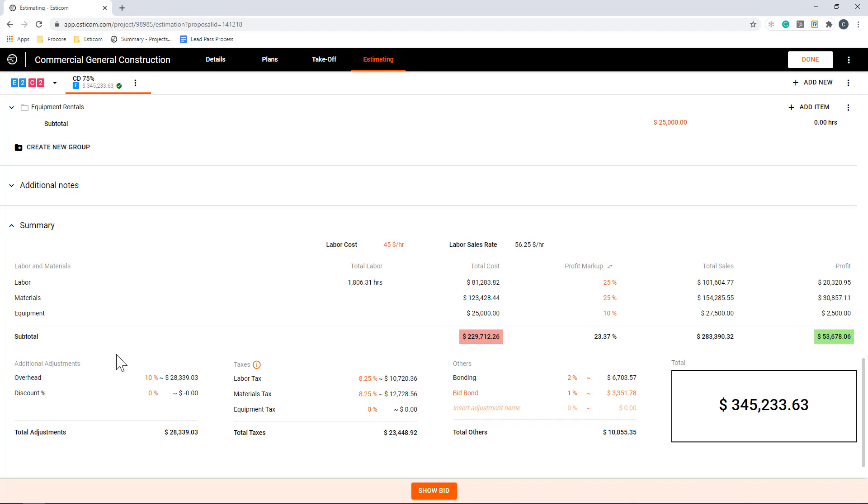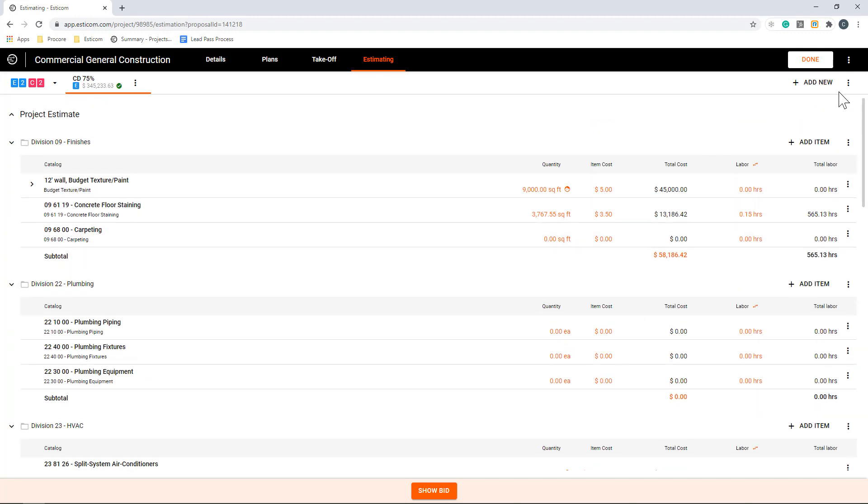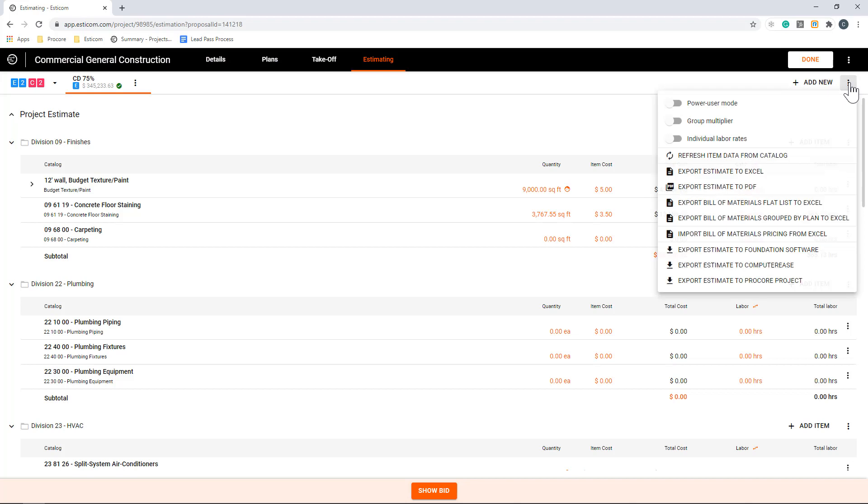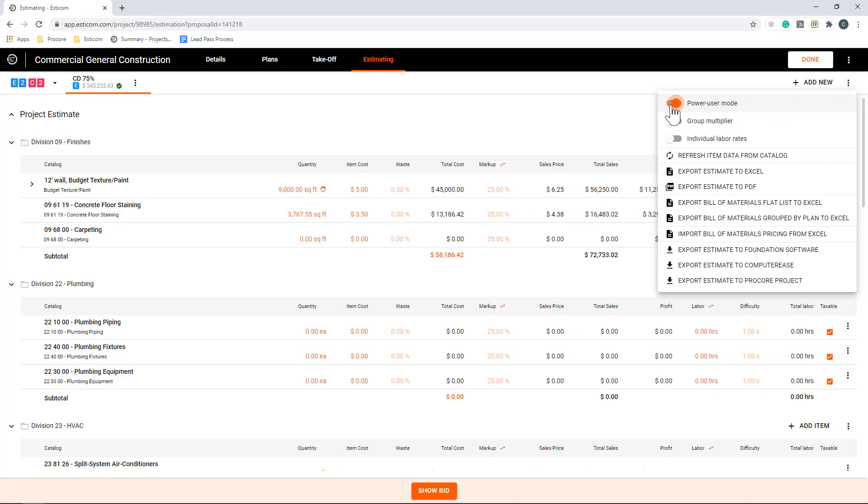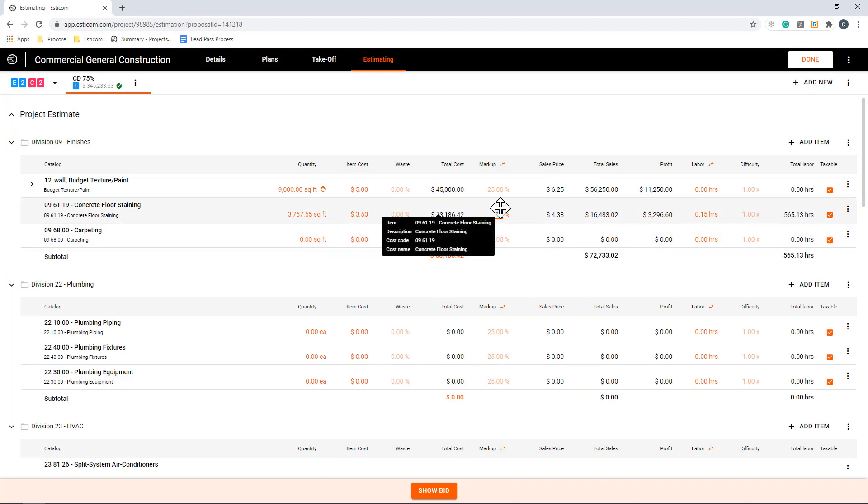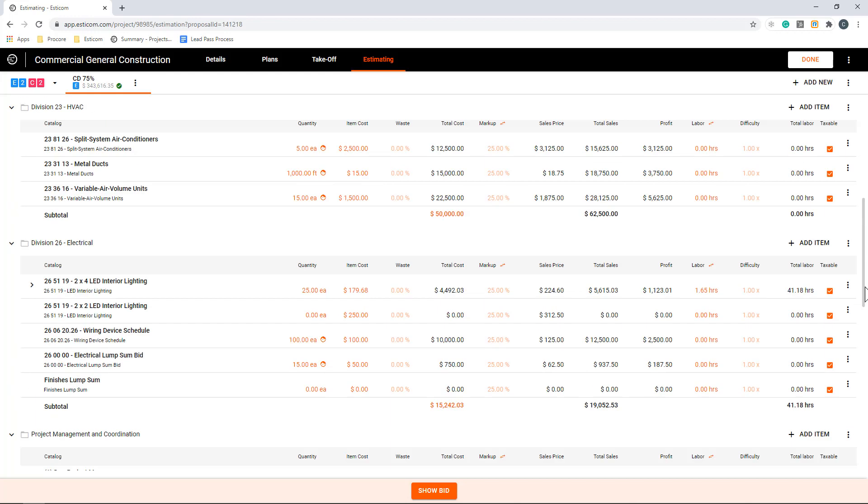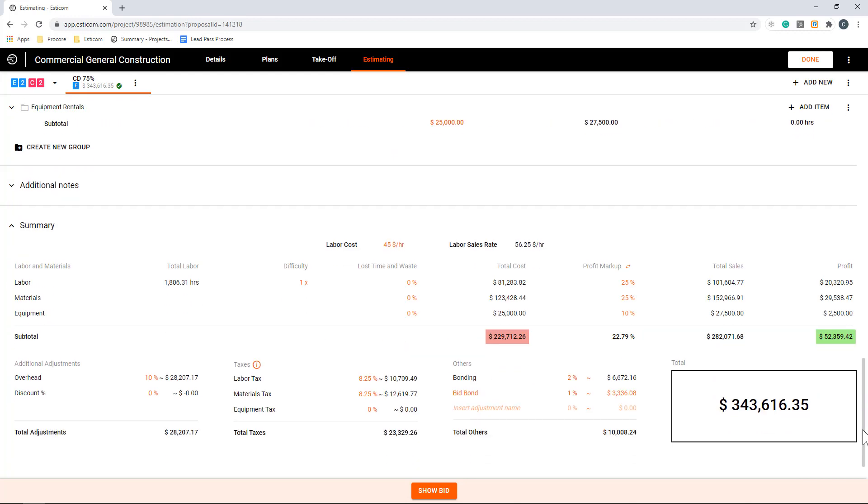In the next section, you can include additional adjustments like overhead, taxes, and bonding. In many cases, a company might desire the option to add waste, labor difficulty, and even the ability to adjust the labor and material markups on a per line basis. This can be done by entering power user mode, which is in the top right-hand corner. As you can see, we now have many more options to adjust costs on the project on an item-by-item basis. Let's scroll down and adjust the profit markup on this item to 15%, and down below, take a look at how it affects the overall project profit. As you can see, there's now a blended average for the project.